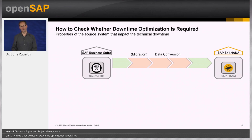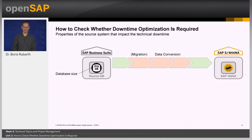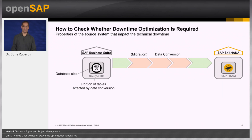Now, properties of the source system. On this slide you see the source system being transferred into an SAP S/4HANA system, with migration in case the source is not yet running on HANA, and the downtime blocks for data conversion. The database size of the source system is an influencing factor — the bigger the source database, the longer the migration and data conversion. But it is not enough to estimate the source database size alone; the portion of tables affected by the new data model is also important for the data conversion part.